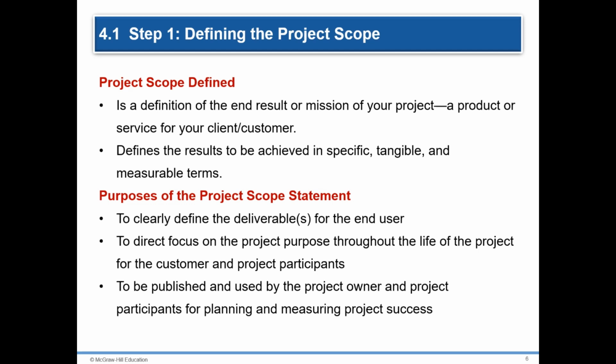Research clearly shows that a poorly defined scope of mission is the most frequently mentioned barrier to project success. In a study involving more than 1,400 project managers in the United States and Canada, Pinto and Larson found that approximately 50% of the planning project problems relate to unclear definitions of scope and goals. This and other studies suggest a strong correlation between project success and clear scope definition.